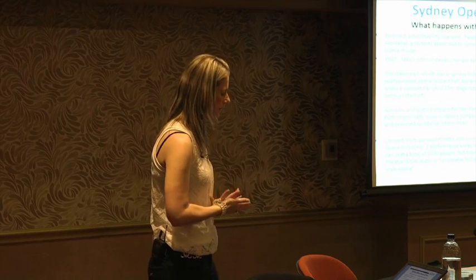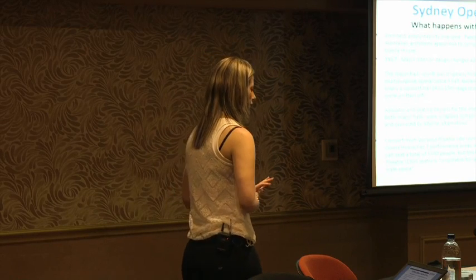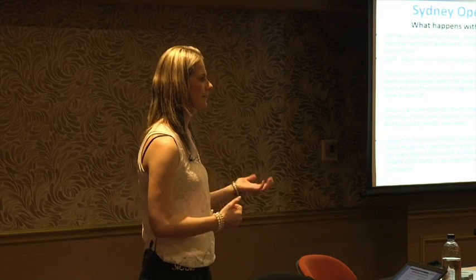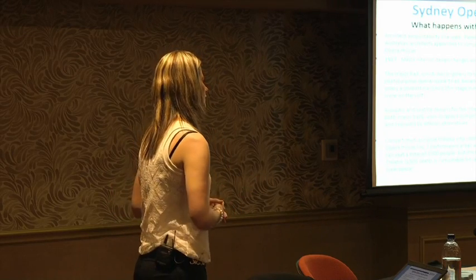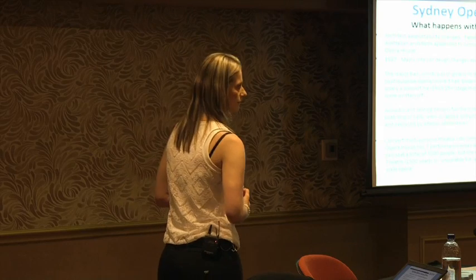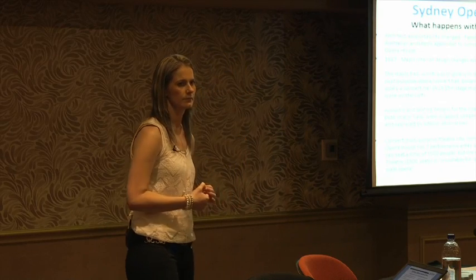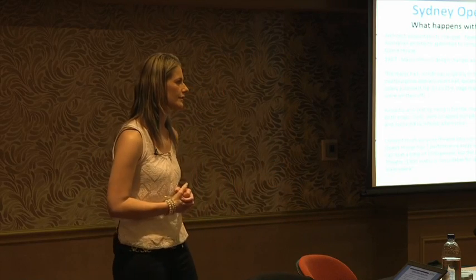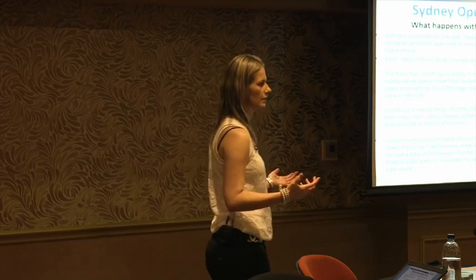So basically what it boiled down to, the Sydney Opera House took them in total 14 years to complete, and they went from 7 million Australian dollars to 102 million expenditure. So it's more than 10 times what their initial budget was.